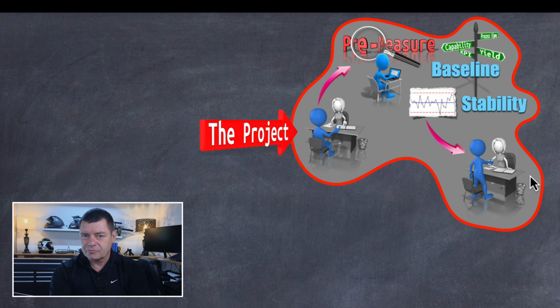Communication frequency, type of communication, actions on things going wrong or people not turning up or finding that there's no value with this project. And then the second part of that is getting buy-in to the plan specifically. And that plan, or the key parts of the plan you want buy-in to, is who you need to get the project done and when you need them.